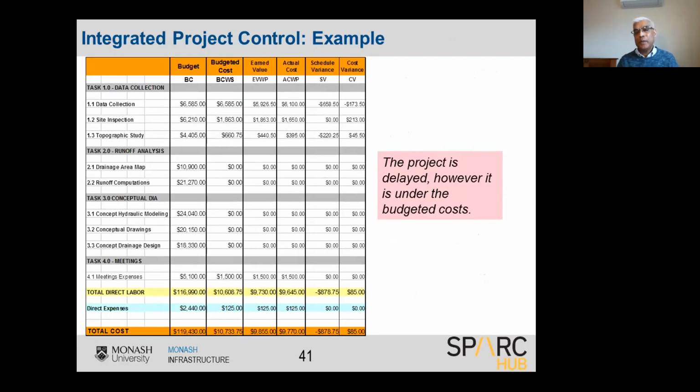That's because it's not easy. I mean, we can talk about the scheduling, cost budgeting, controlling. They are the theoretical aspects. Once you try to implement it, that is the problem. The challenges are, to go back to the work breakdown structures, how to get the proper work breakdown structures. Too much detail is too much. Too little detail, then you don't have control. So you have to strike a balance.